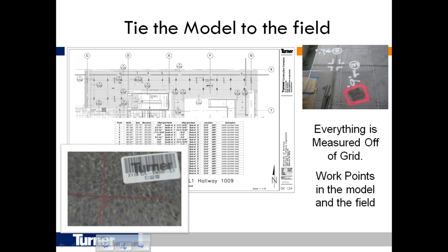So here's an example of again looking at a ceiling with coordinates, the pieces being laid out, and we also generate pre-printed labels with barcodes on them to measure the rate of change and inform everybody as to what's going to go there.